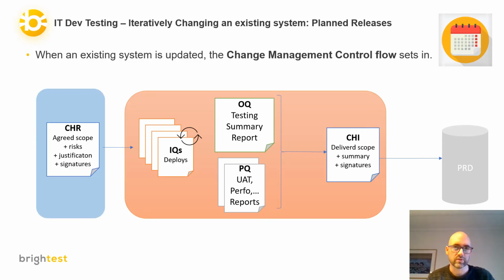It is important that systems that are validated remain in a controlled and validated state. So there is a process needed that allows you to do some limited change management, to add new requirements to the system and make sure that we can test releases separately and make sure that the system stays validated. This is often called the change management control flow.